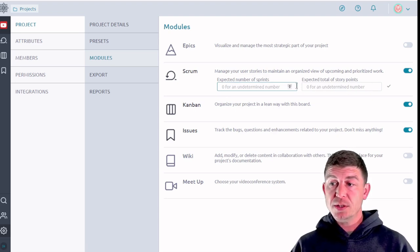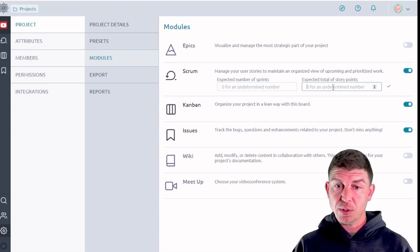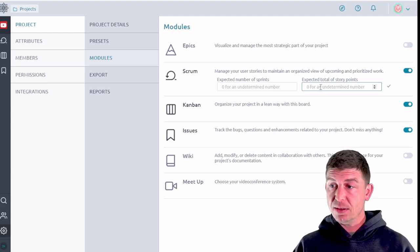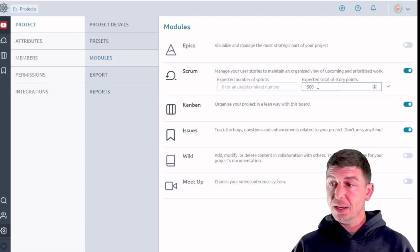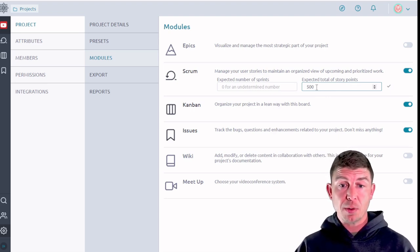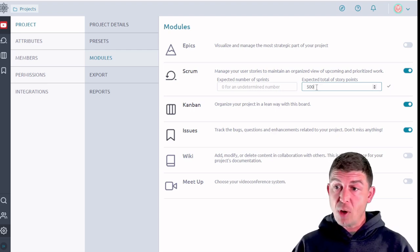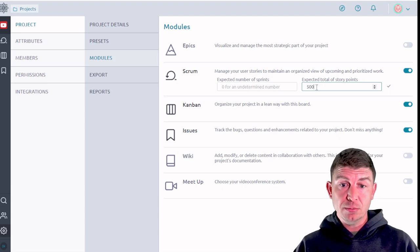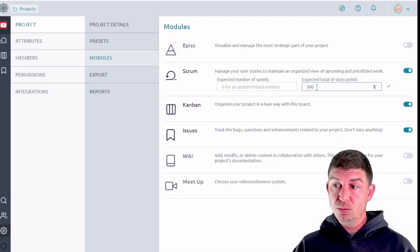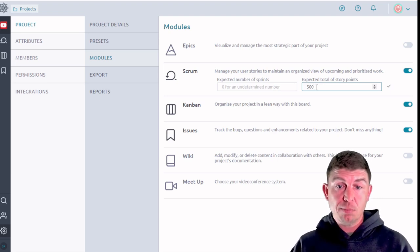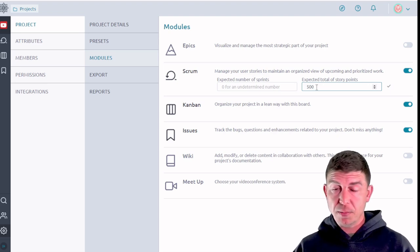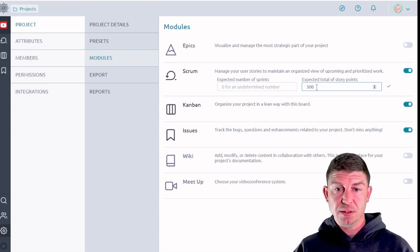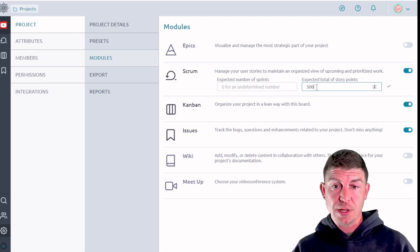So this is the total number of story points for the entire project. It's not what you expect to be in each sprint. So let's say that this project requires 500 hours worth of work and story points, again they can be representative of hours or they can be representative of priority. For example if a thousand users reached out and said that they wanted dark mode using the previous example, then the create dark mode user story may have more story points associated with it.